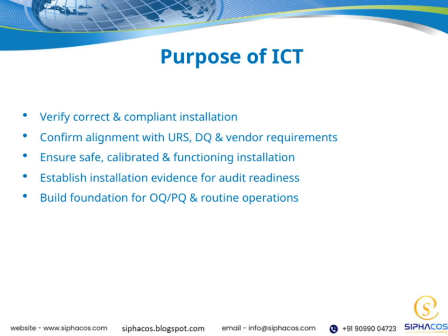Establishing solid installation evidence is vital for audit readiness. Documentation and proof that the installation was performed correctly will support compliance during audits and inspections. Finally, a correct installation sets a strong foundation for subsequent stages like operational qualification, OQ, and performance qualification, PQ, as well as routine operations.